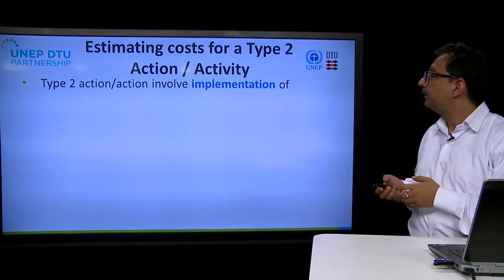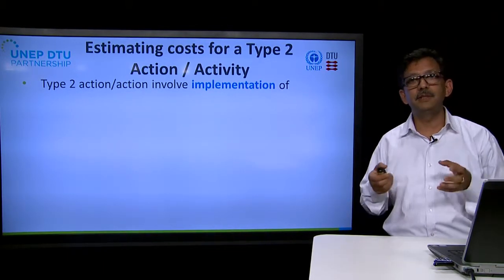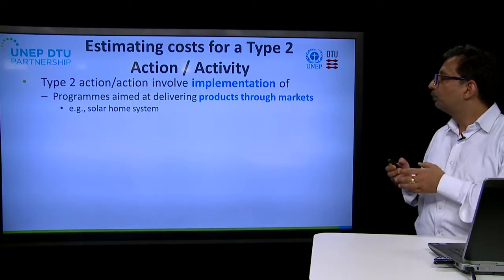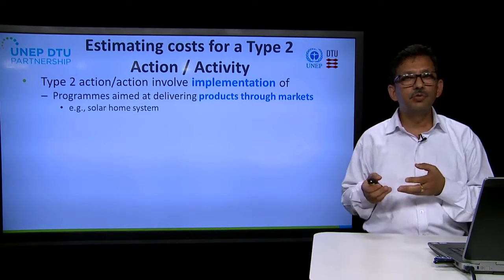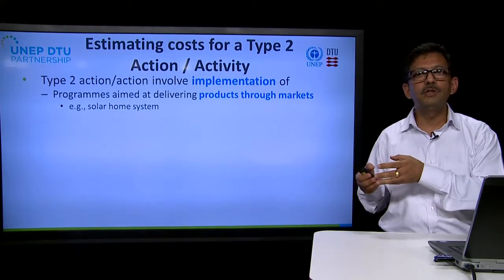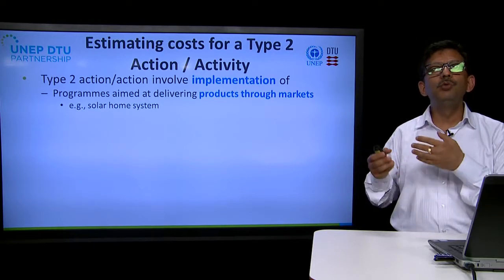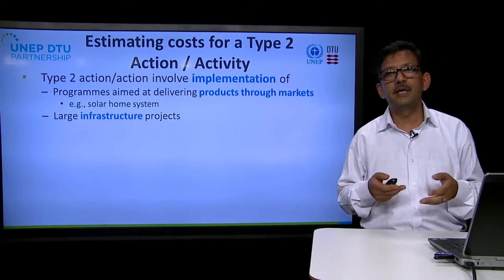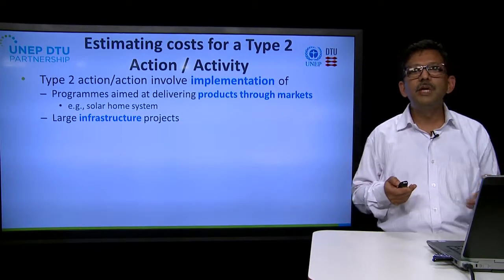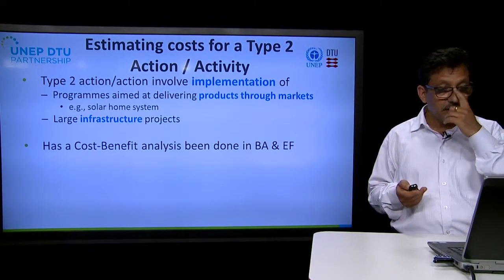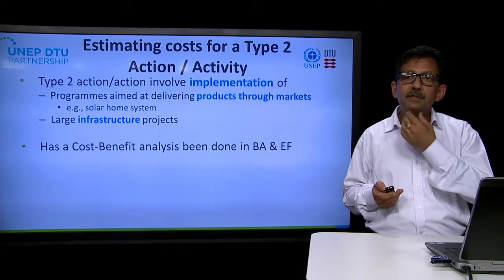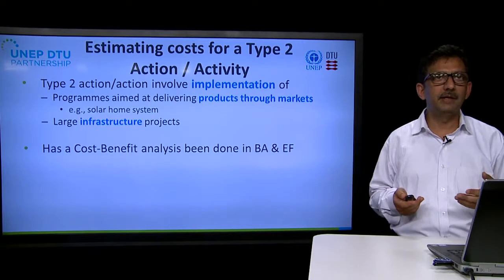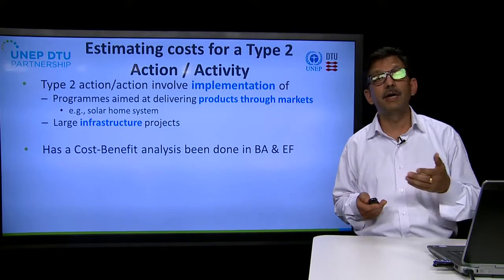Coming to type 2 activities — these are more related to implementation. They could involve the implementation of programs aimed at delivering products through markets, for example solar home systems, where the cost of the technology is borne by the consumers but the government is trying to improve the incentives. There could also be large infrastructure projects like hydro projects or dykes in case of adaptation, which would need public funding. To estimate the cost of these actions, we should first look at our barrier analysis and enabling framework reports, where cost-benefit analysis of different options should have been done. If we have done that, we have a starting basis for identifying costs.